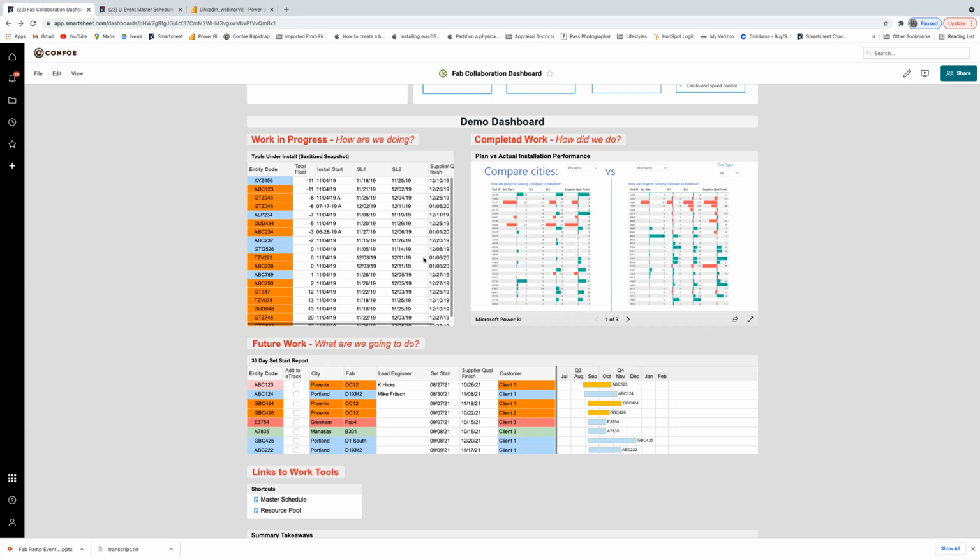The next column is total float. That's how many days ahead or behind you are on that tool that's in flight. And if there's an A behind a date, that means it has been actualized. That's interesting, Kirby, but look, the first two tools haven't even started and they're 11 days behind schedule. What does that mean?